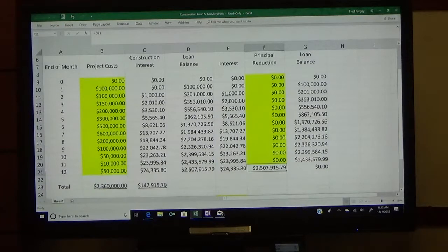So you could have a situation, which is somewhat common, that you finish all the construction, you get the certificate of occupancy, you've leased up the property, but maybe you've only got it to 50% occupancy, and the permanent lender is saying, we need 75% occupancy. So you're sitting there in this weird zone where you're still on the hook to the construction lender, and you usually have a higher interest rate with the construction lender, so you're paying them considerably more interest to continue having that money outstanding before you get the takeout commitment from the permanent lender.